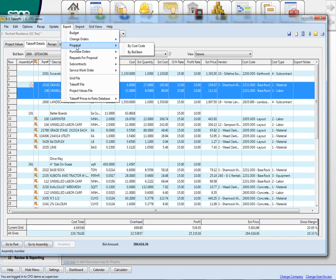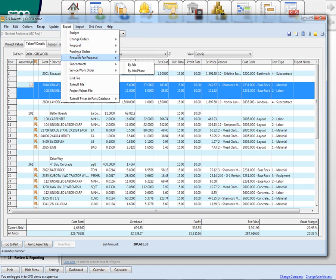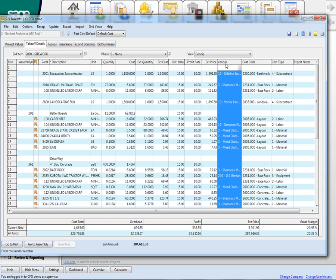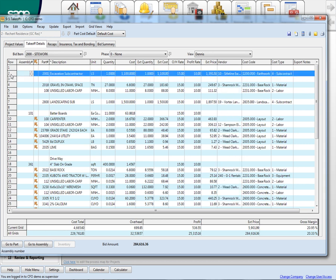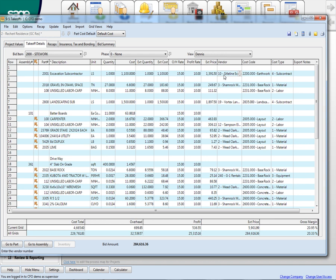You can print a proposal. They're not as fancy, but you can probably modify one the way you want it. But I can print my subcontracts and I can print my purchase orders based on the quantities I have in my bid. So right here, if you look over here, I've selected the vendors. So in this case, just as an example, this excavation sub gave me a quote for $1,100. So I will now print a subcontract for siteline for $1,100 for job number two to do the site work with your verbiage on it. It's a format that you can change or we can change, but it'll look just the way yours does now.